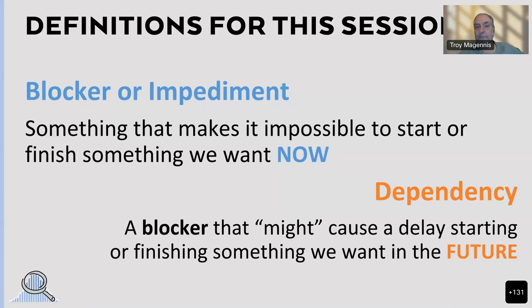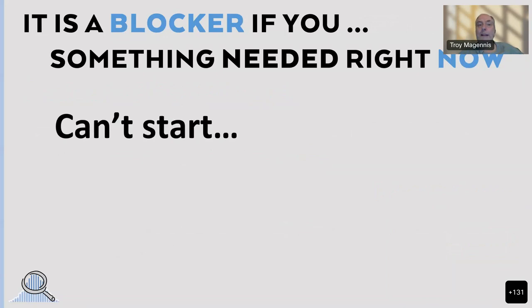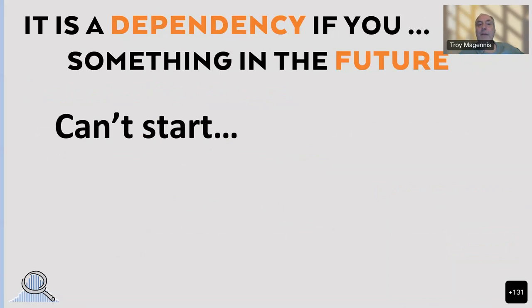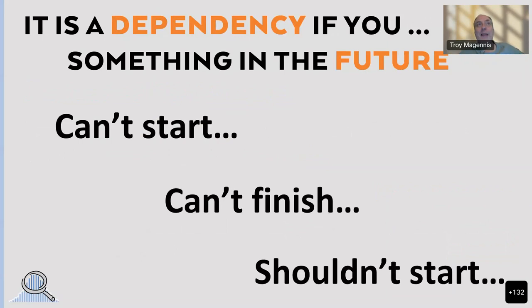Work was blocked historically because of dependencies you could have predicted and called a dependency in advance. Blockers and dependencies are the same thing — it's just when you're going to encounter it. If it's in the future, it's a dependency. If it's in the past, it's a blocker. This means that if we analyze data around blockers and impediments, we can understand the highest frequency and highest impact reasons work was delayed and go solve them. To manage dependencies better, you really need to get a handle on what impeded work being started or completed in the past.